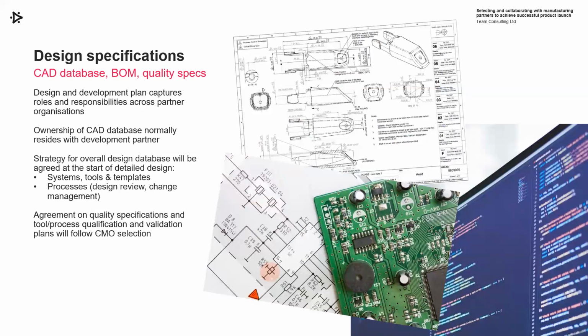In terms of the design specification, so this is development of things like CAD databases, PDM systems, what templates are you going to use, what reference systems, etc. The design development plan at the start of the program should capture roles and responsibilities across organizations, but make sure you have those in place.